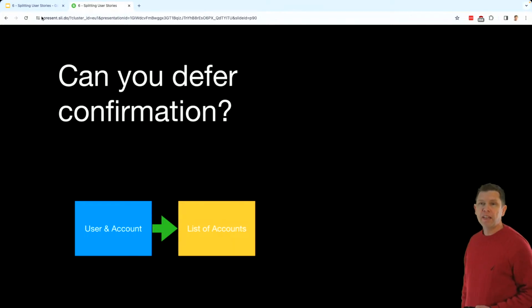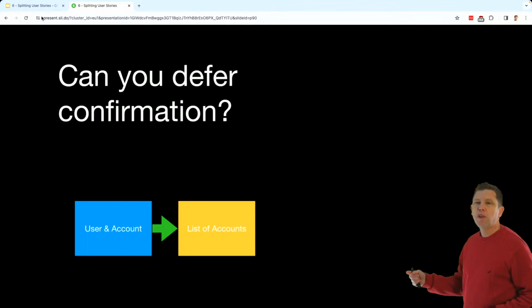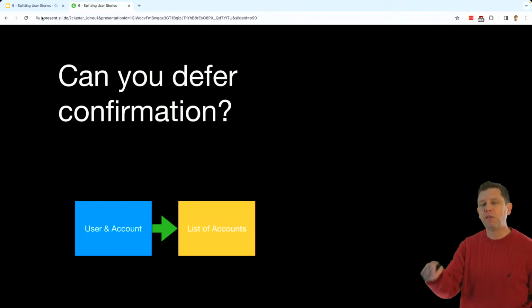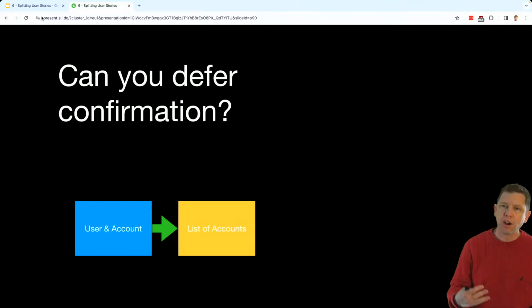Now that we can create users in our system, let's create this other part that we figure is really, really high risk, but we had to have some type of user object in place before we could build it. And so then they can address those things that are higher risk for them.